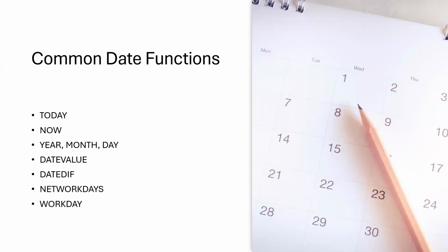To make it more complex, you tell Excel, part of my data is a start date, and I have 15 days or 20 days or 30 days to add to my starting date, and I want you to tell me when I'm going to finish. But I have a series of holidays in these weeks that I'm going to work. So exclude those holidays and the weekends. That's how you get the effective work days.